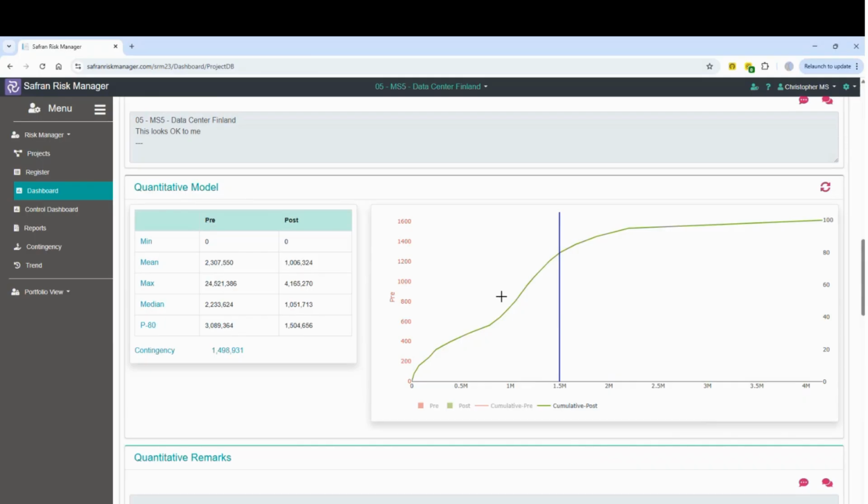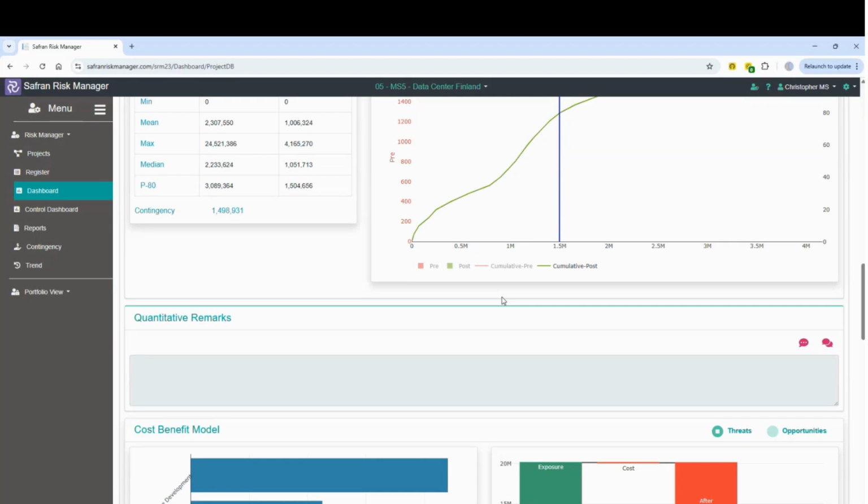So I've actually been in reviews with management, and I've presented to them a Monte Carlo chart, or the histogram I should say, and they've essentially looked at it, not realized what it was telling them, and not wanting to look stupid in front of the people who are in the review, quickly moved past it. Whereas there's a great deal of information to be had there. And if only I'd learnt sooner to put my own commentary against it, and that says we're running at a P30 on our contingency and it's insufficient, then the decision makers can take that information and say, right, why are we holding such low levels of confidence against our exposure? It starts to add life and really bring the information to the decision makers' perspective so they can make better decisions by having commentary. And I think that's quite a valuable addition to any of our reporting capability.